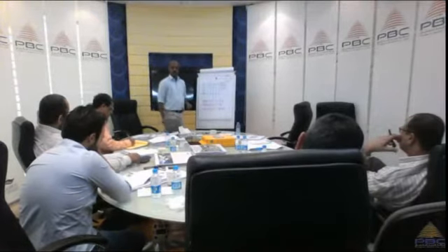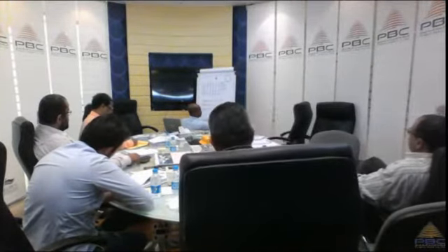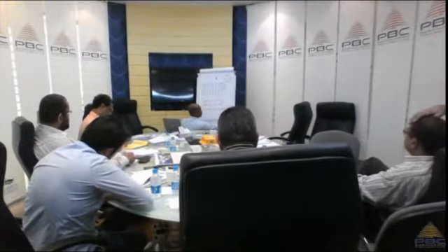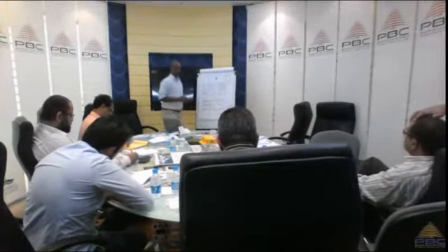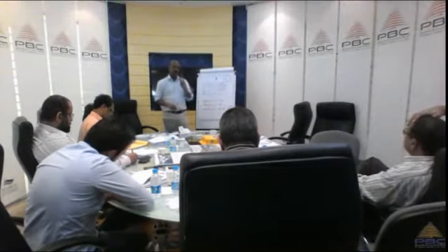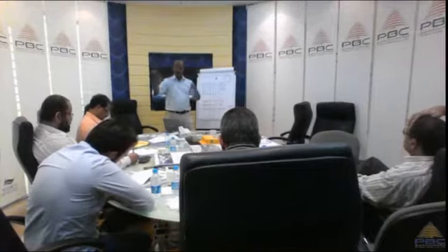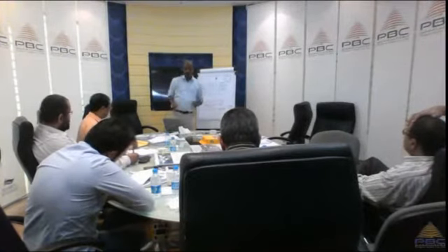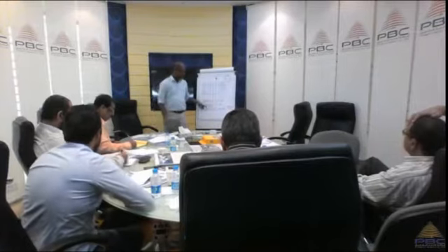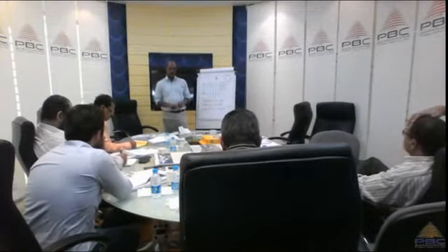The value, يعني بالعربي قيمة العمل. Now, that's one dimension which is very clear, and this gives us what is known as the cost variance, CV. So comparing these two gives me my cost variance. Now, what about another important variance? I'm worried about cost variance, and the other one is the schedule variance. When I compare earned value to planned value, I get my schedule variance.